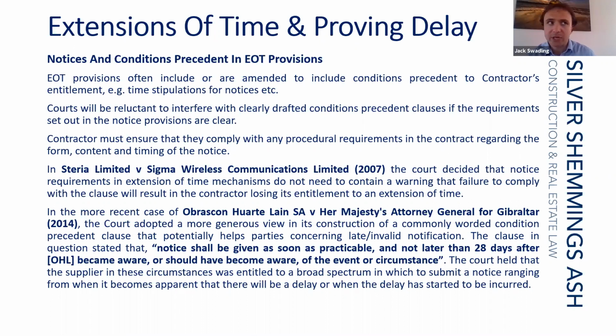And so it can be seen that these sorts of limitations prevent a situation where delay is being dealt with in one huge morass of argument at the final account stage, when really these should have been dealt with as and when the issues were arising between the contractor and the contract administrator or project manager.